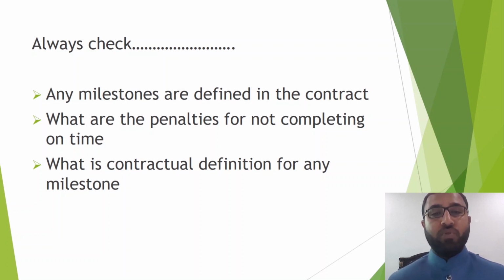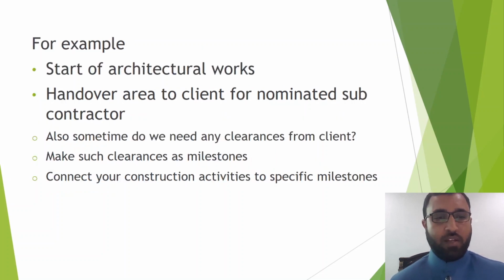So you need to understand the definition of the milestone, because later on you are going to connect your related construction activities with those milestones, with the completion of those milestones or the start of those milestones. For example, the start of architectural works is a start milestone, and handover of area to client for the nominated subcontractor is a finish milestone.